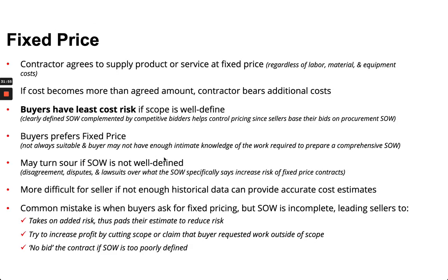If you look at fixed price, the contractor agrees to supply the product or service, simply put, at a fixed price, regardless of pieces and parts and things of that nature. But if the cost becomes more, the contractor has to bear it.